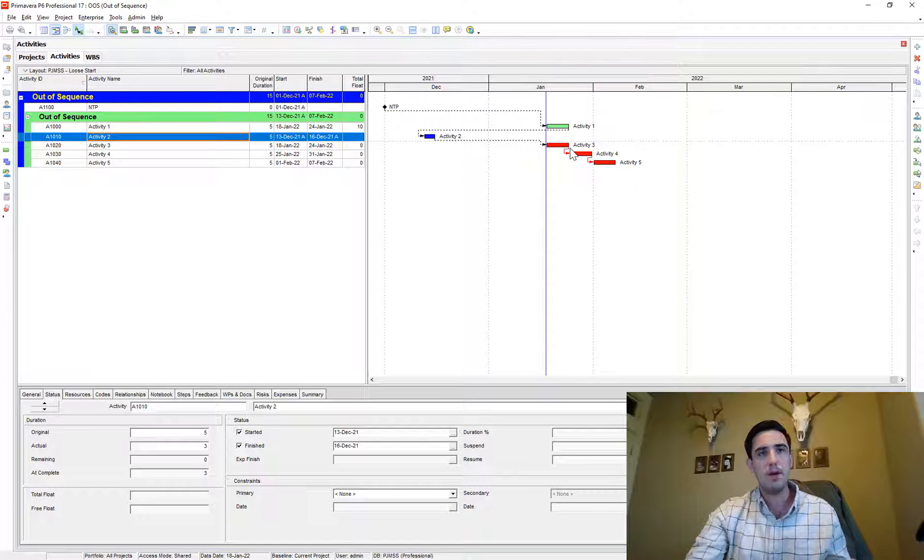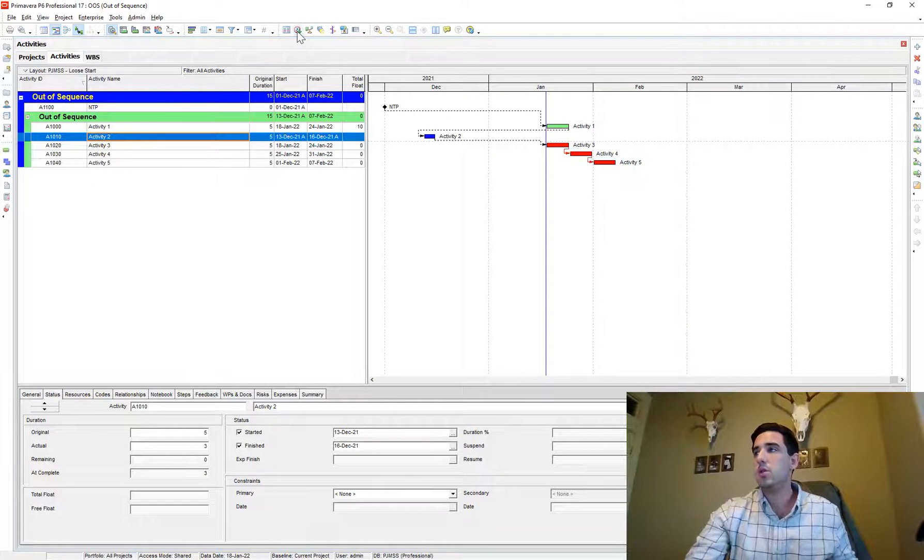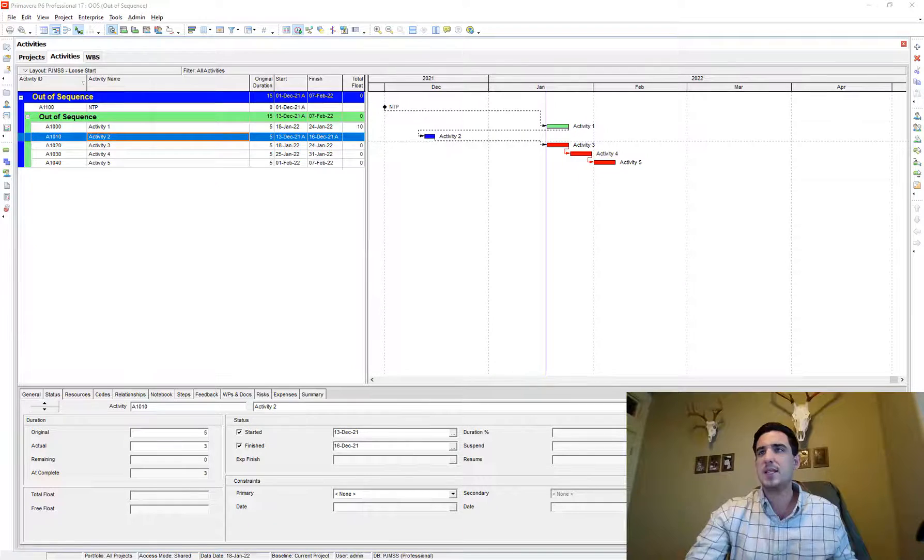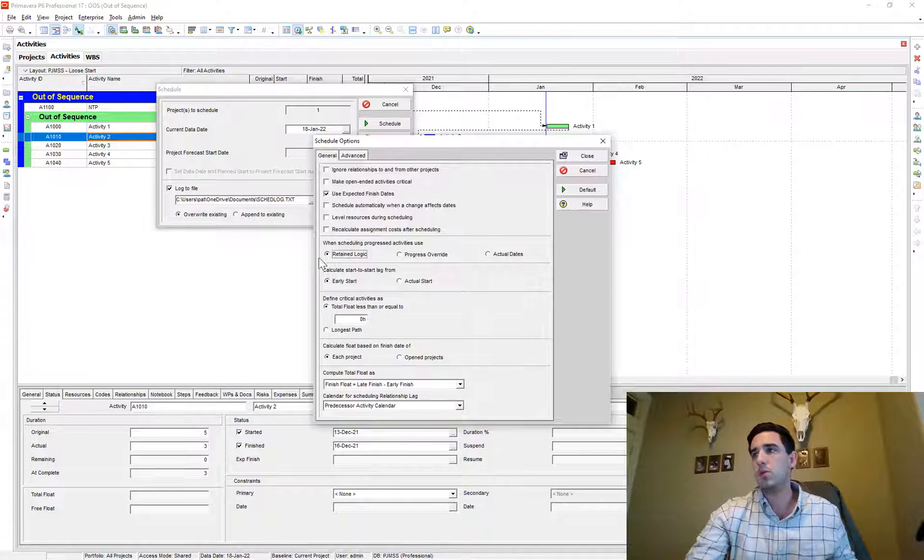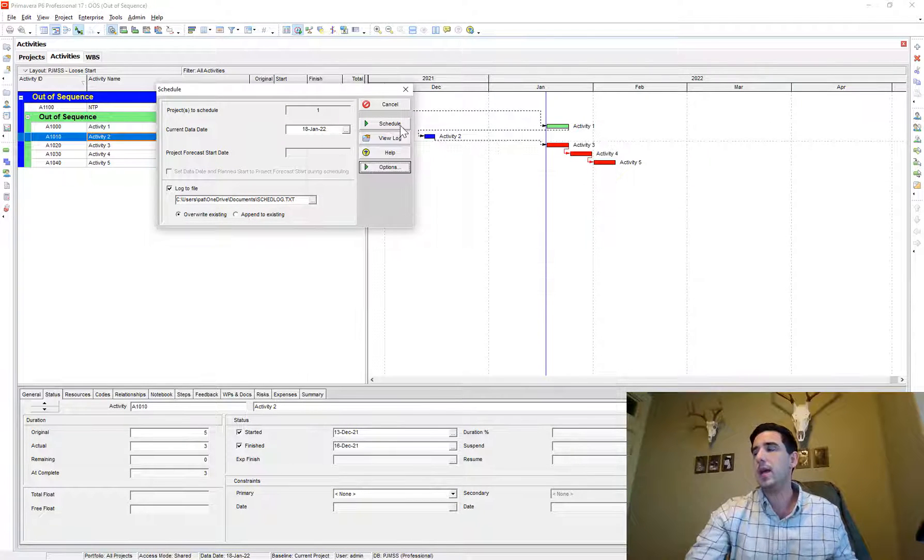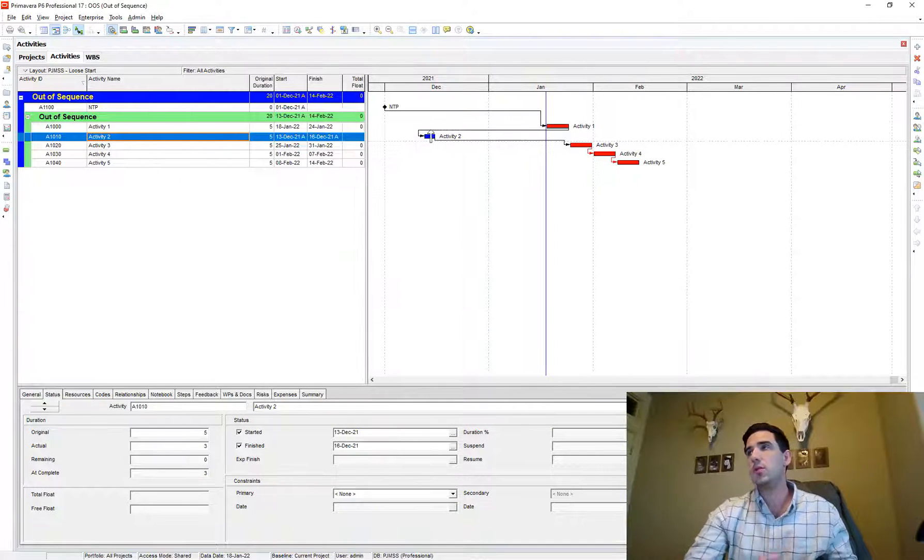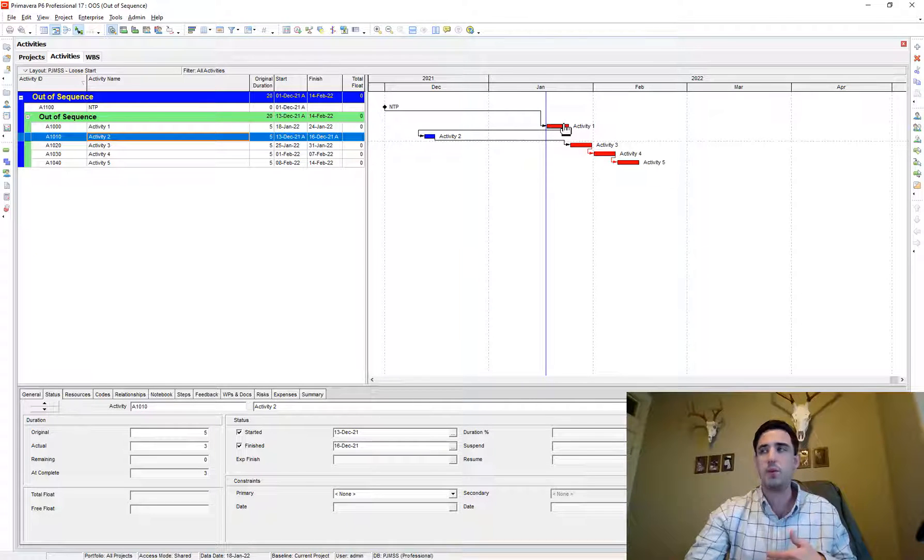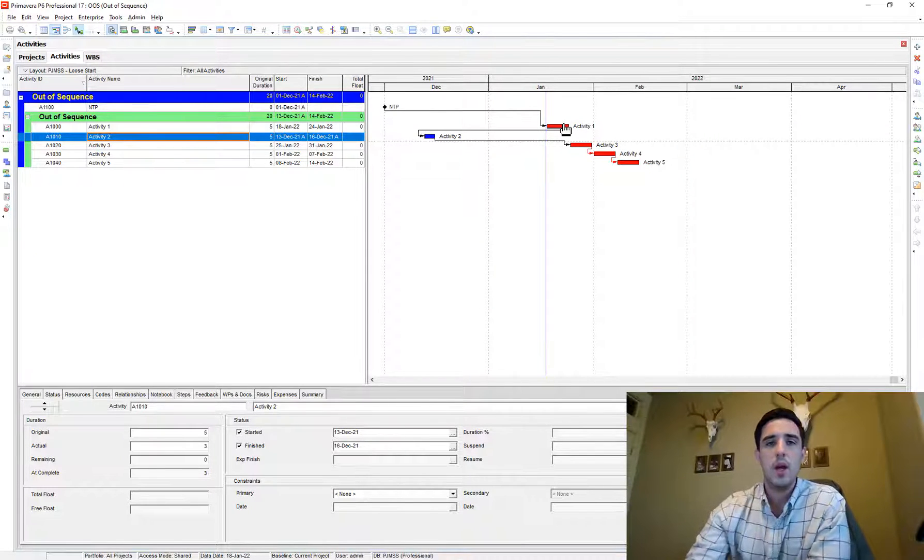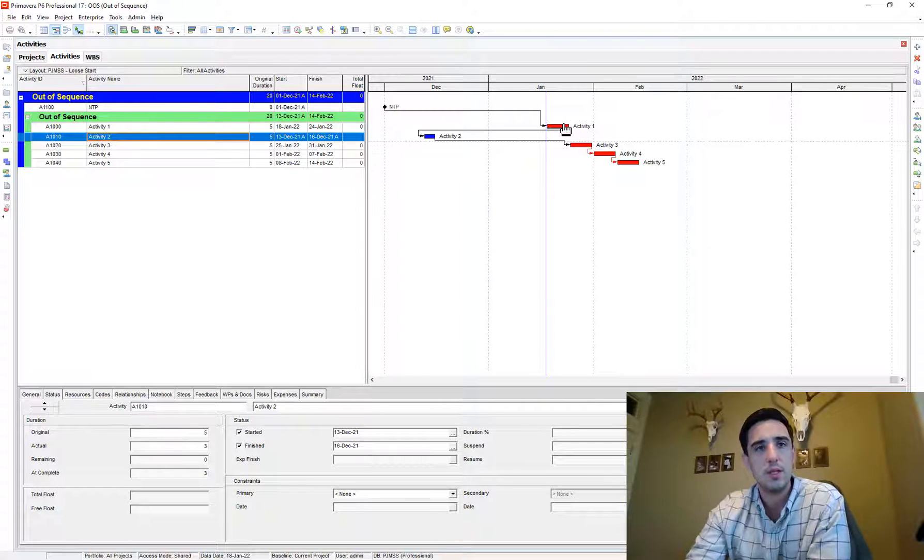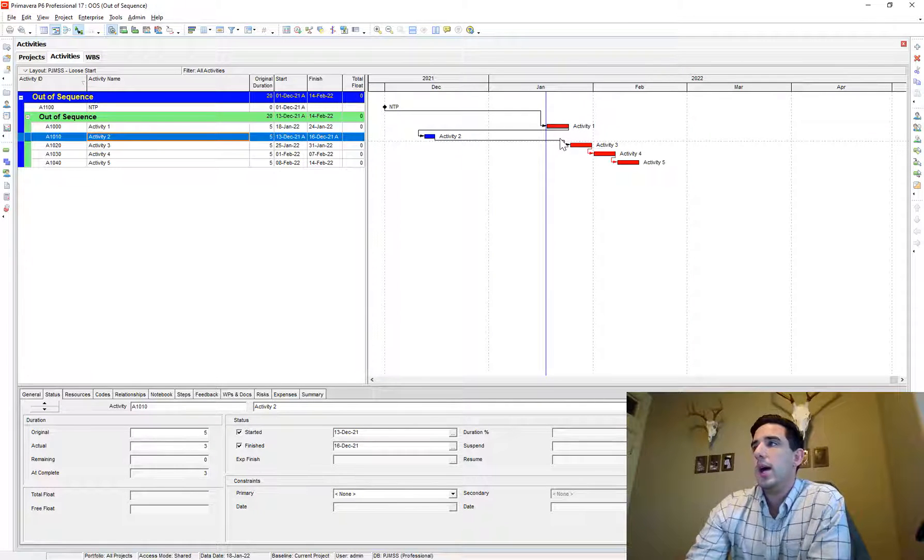So those are the two primary methodologies used when scheduling. Like I said, most people use retained logic. And so using retained logic that causes us to have to go and correct for the instances of out of sequence progress.